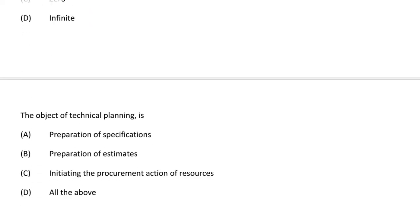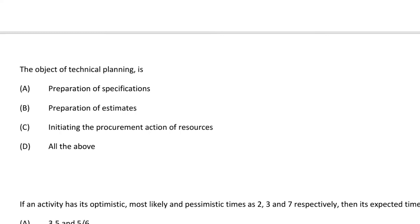Next question: the object of technical planning is — option A preparation of specifications, option B preparation of estimates, option C initiating the procurement action of resources, option D all the above. The correct answer is option D, all the above.